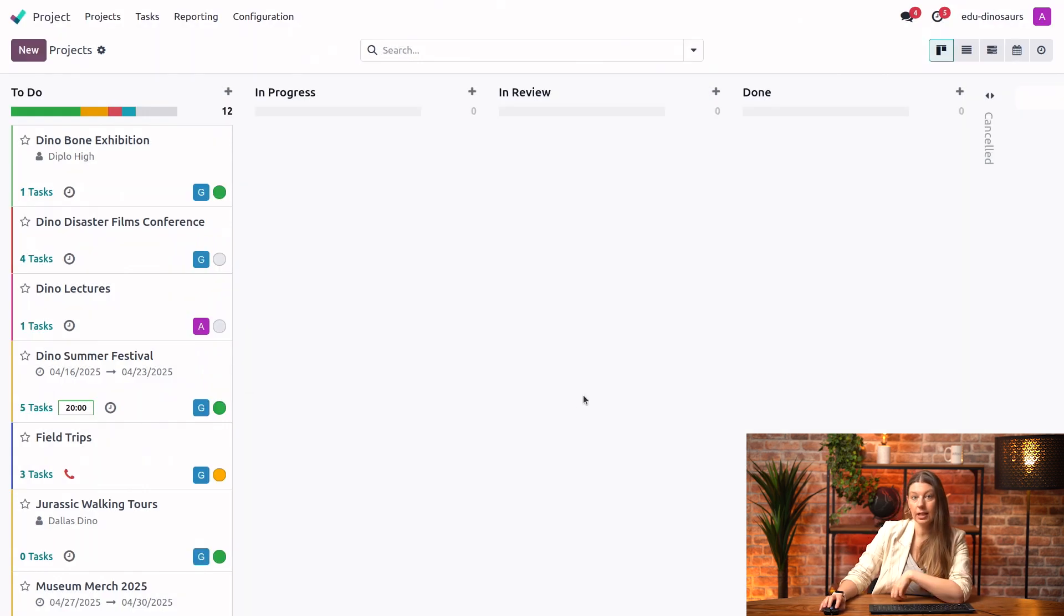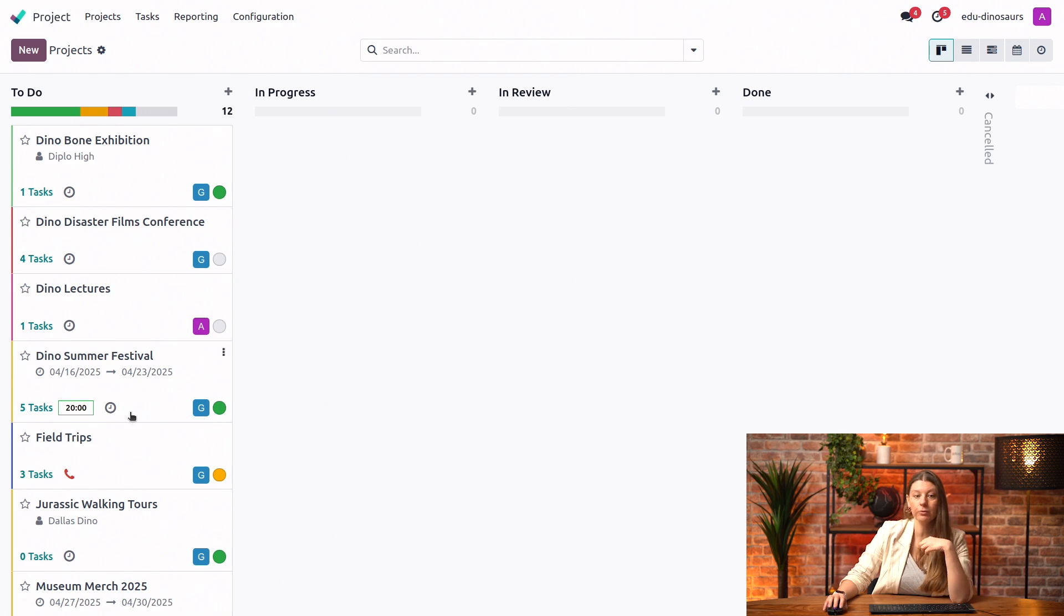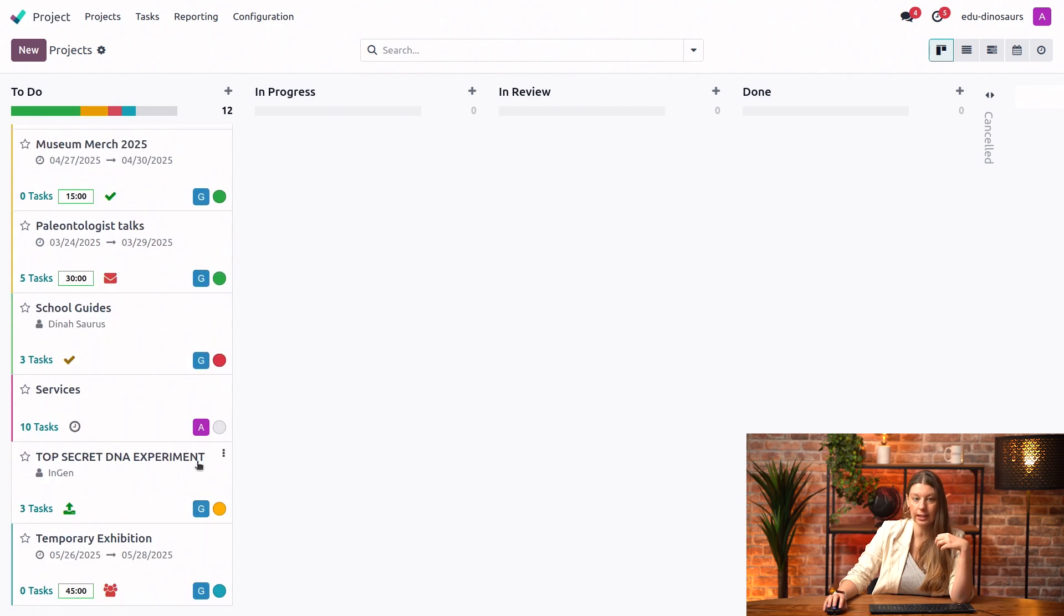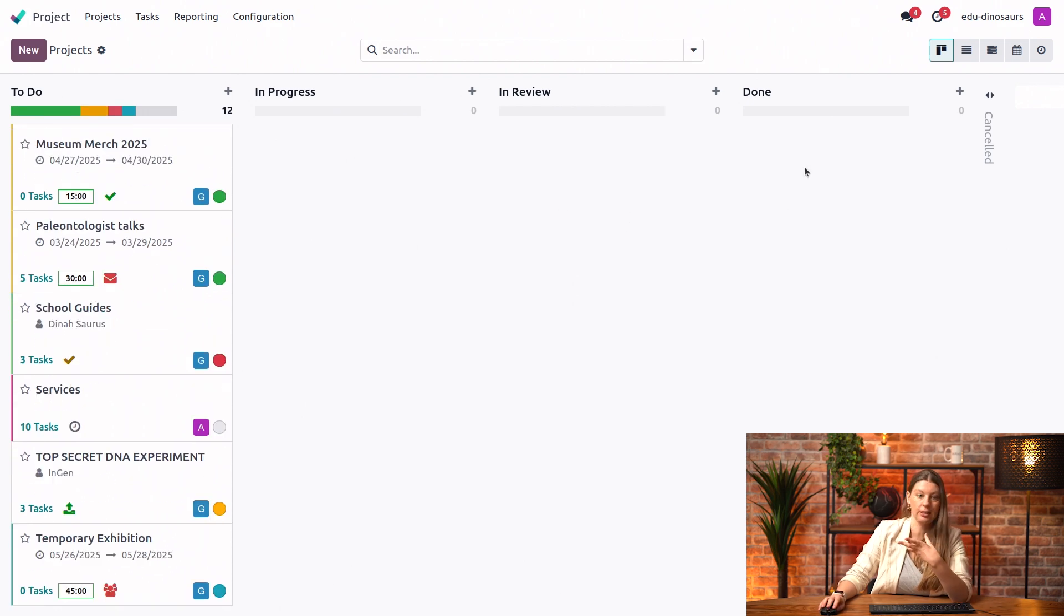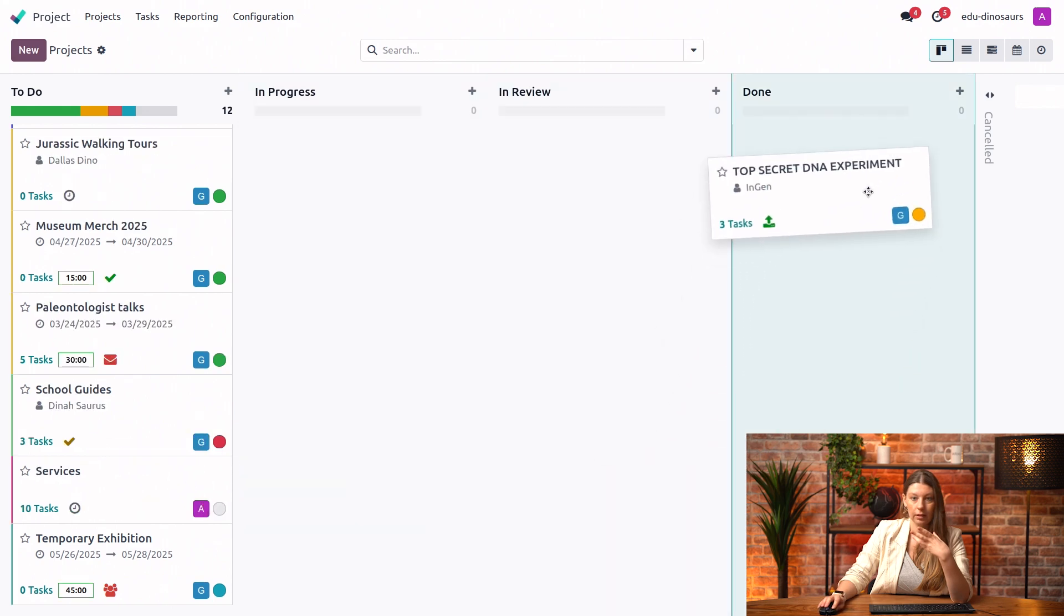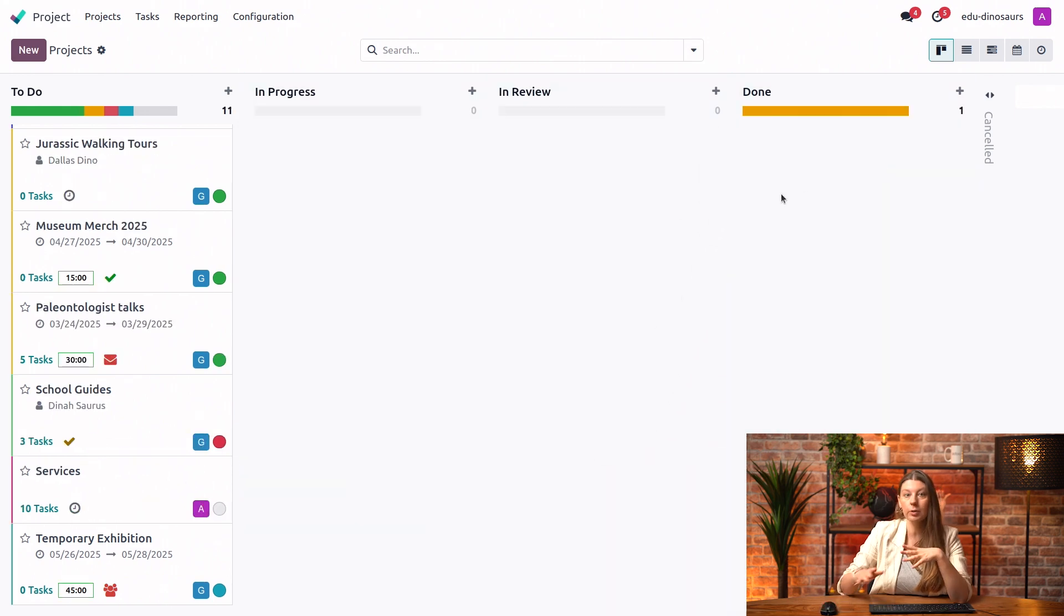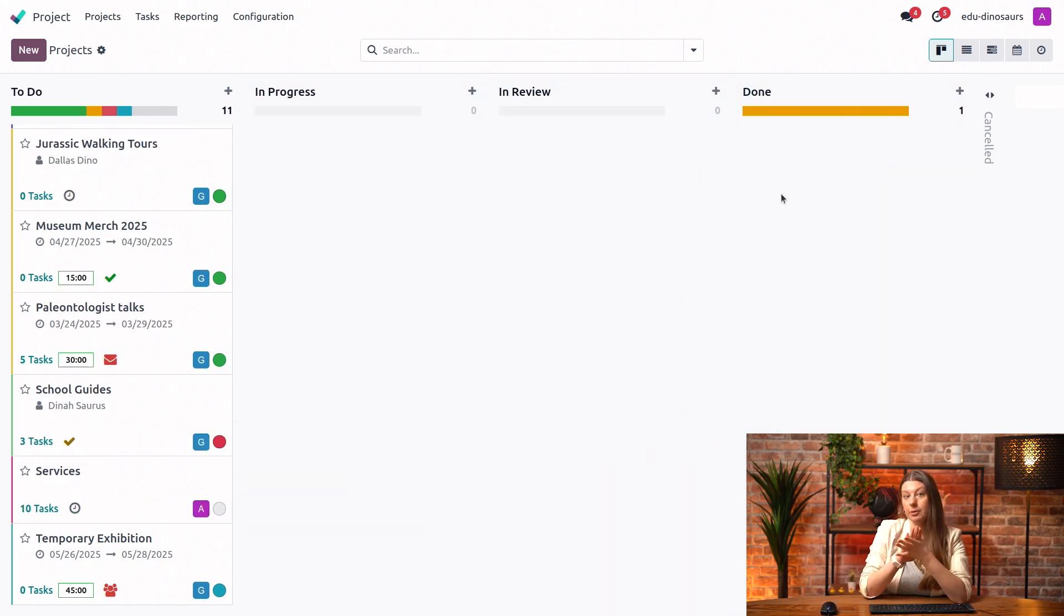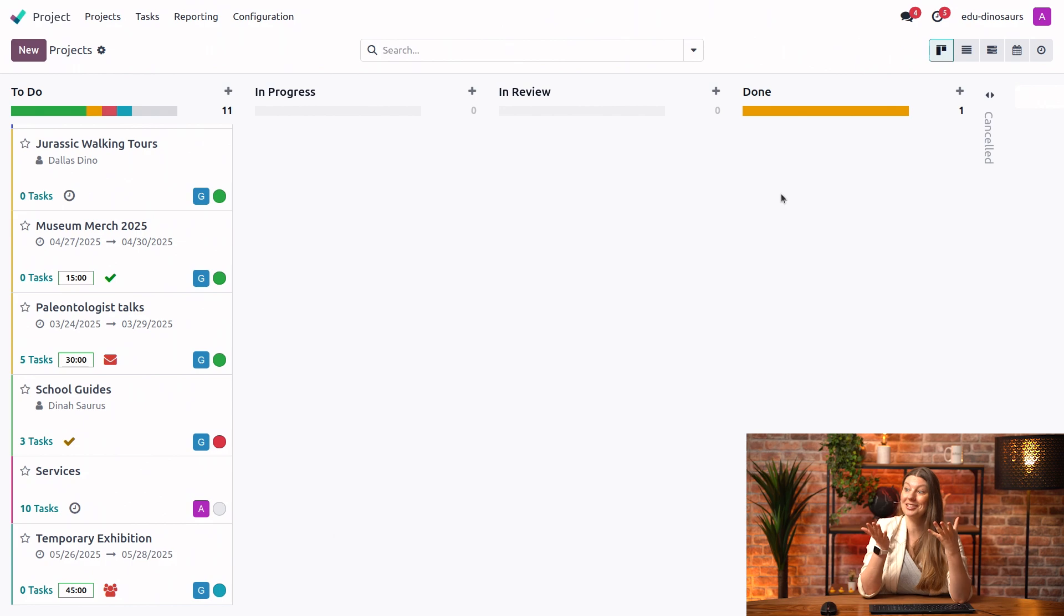So once I've done that, the minute that I move another project into this done stage, the client will be automatically notified via an email about the fact that the project has been completed.